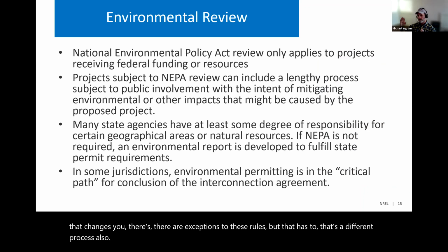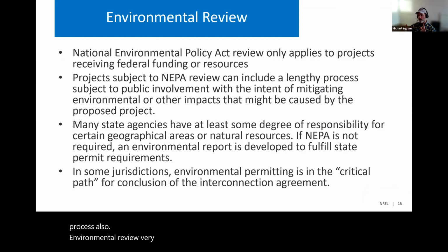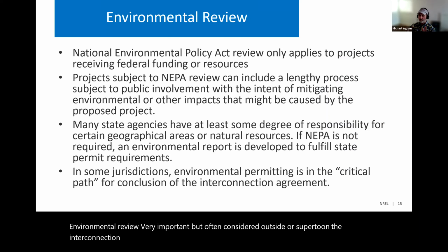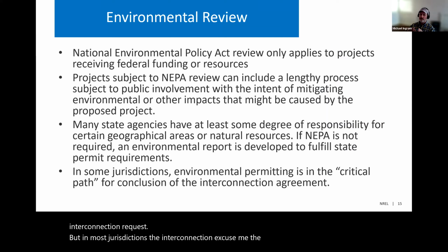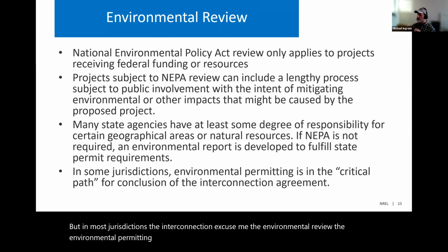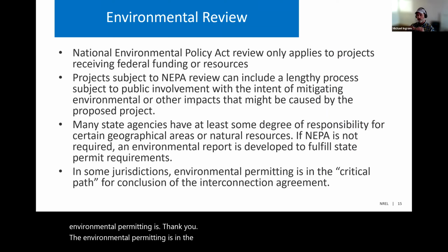Environmental review is very important, but often considered outside of the interconnection request. But in most jurisdictions, the environmental permitting is in the critical path for the interconnection agreement.